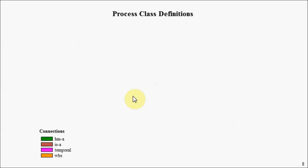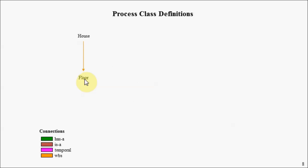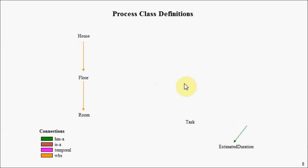So let's now define a process for creating a house. We start with a house entity, which becomes a record in the class table. We have the notion of a floor and a work breakdown structure connection between them. A floor is broken down into one or more rooms — all records in our class table. We'll introduce the notion of a task, and the task will have a property called estimated duration.